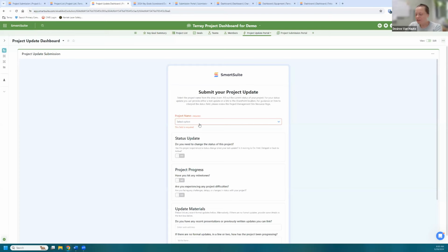And the project closeout, we actually have done similarly. So in the first couple months of this year for project closeouts, I went and talked to everyone and said, this is what you said your impact was going to be. Tell me how this project has actually impacted this process. Let's talk through it. Let me understand why you made this choice. How do you think it could have gone better? What did you really like about this? And we took those and we made a closeout form. And we'll probably be automating that in the next 2 weeks as we meet with project leaders.